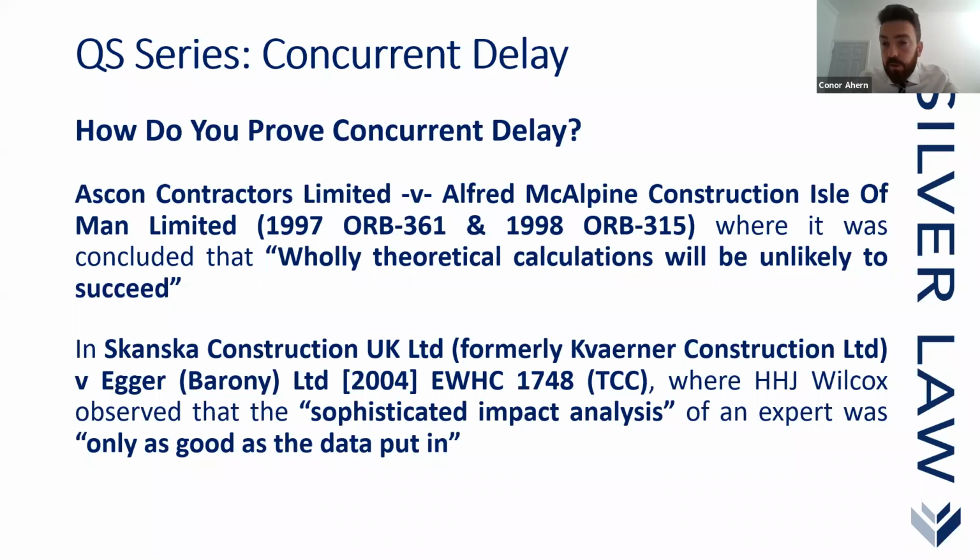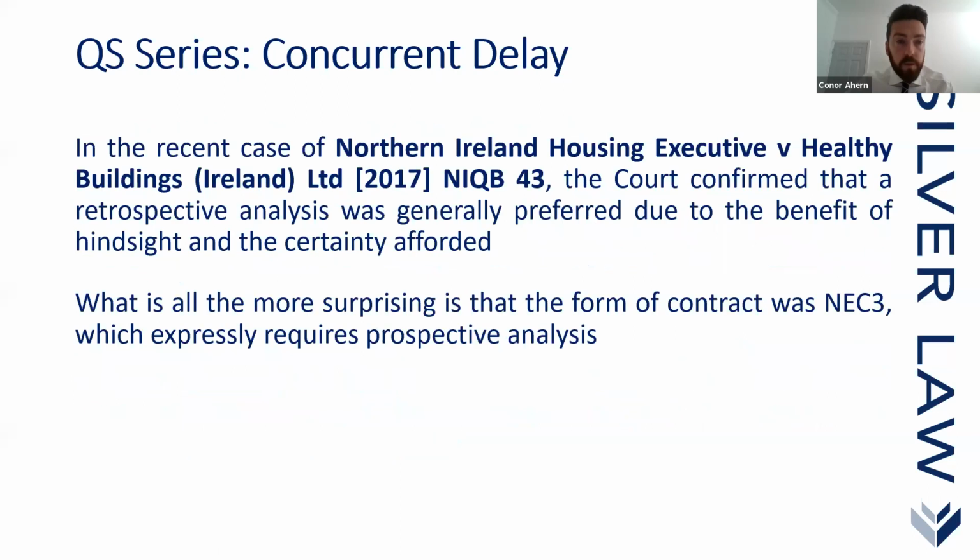All that information, the site diary, is really good, just to be able to point to the information that shows that any delay analysis is correct, and it relies on substantial and detailed data, which is the bedrock of any good application for an extension of time and to be successful.